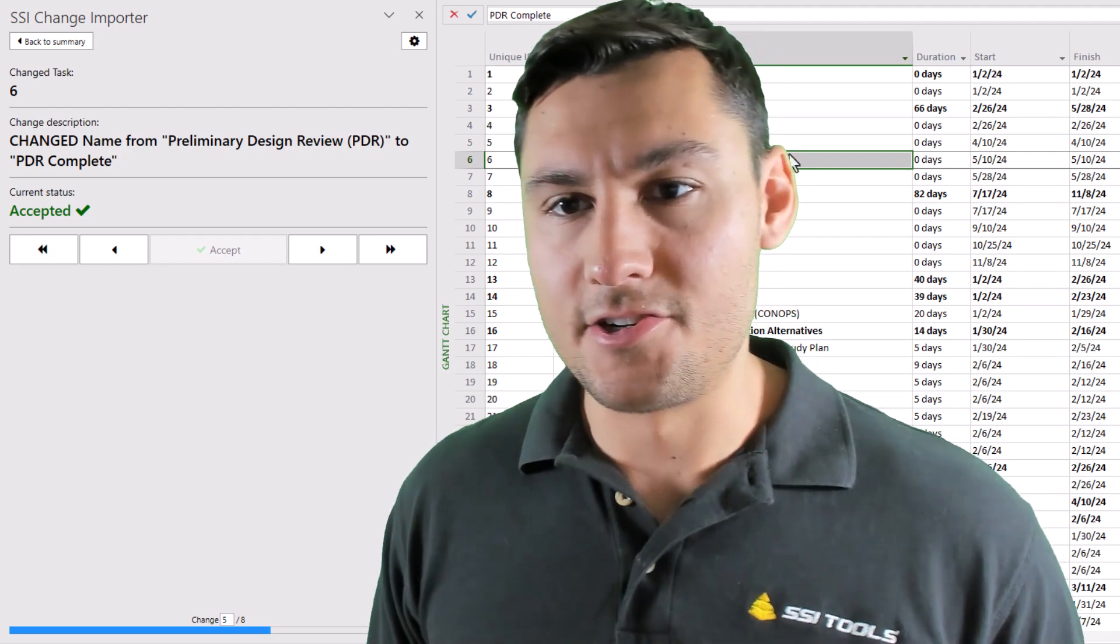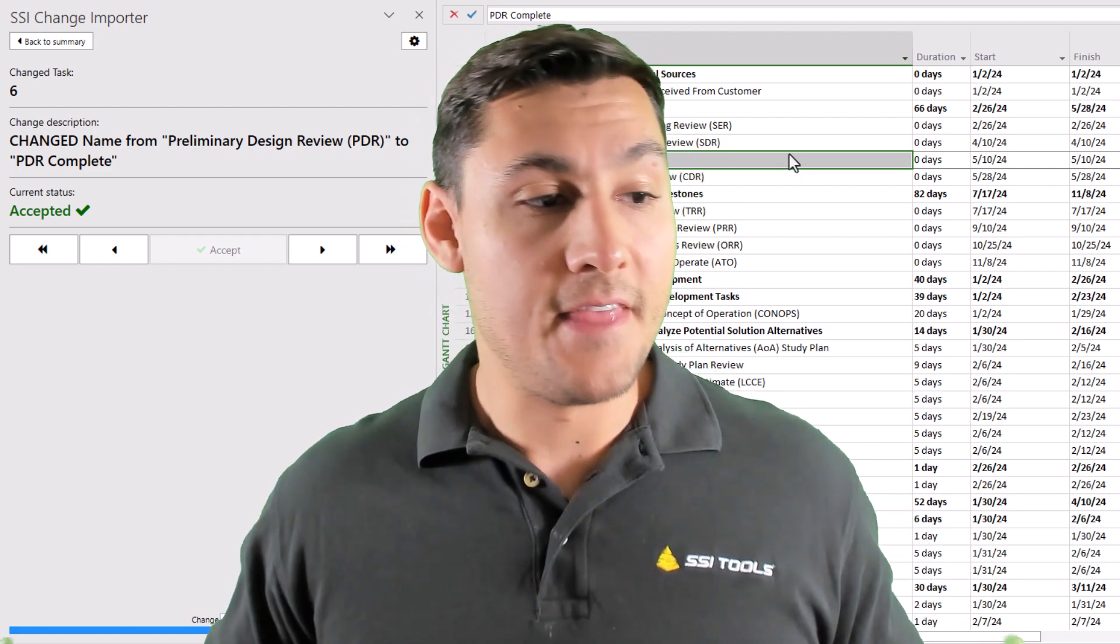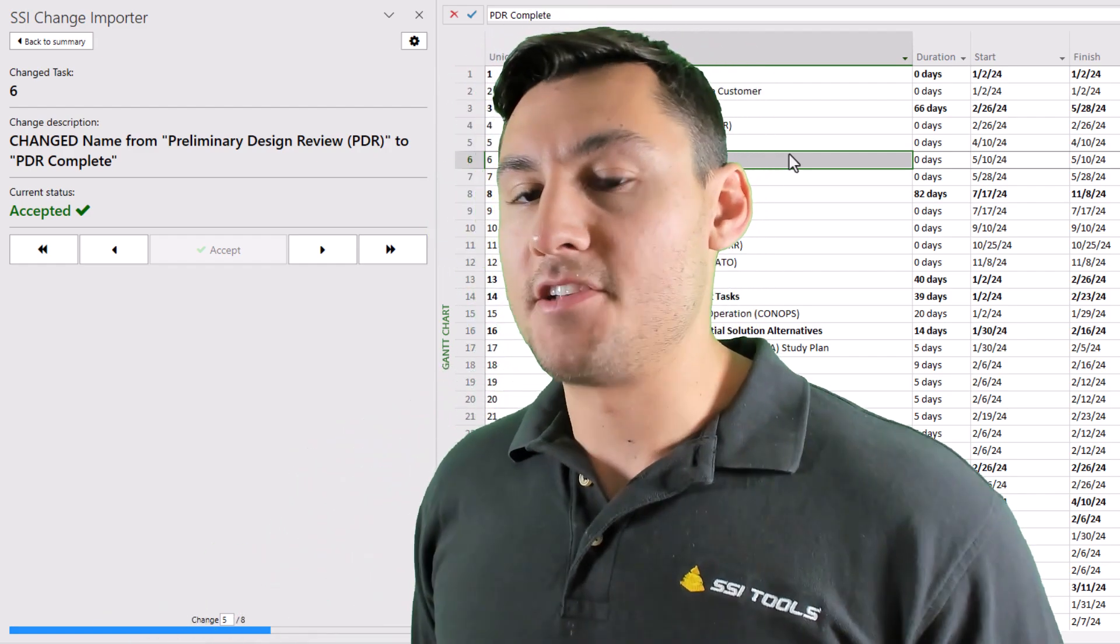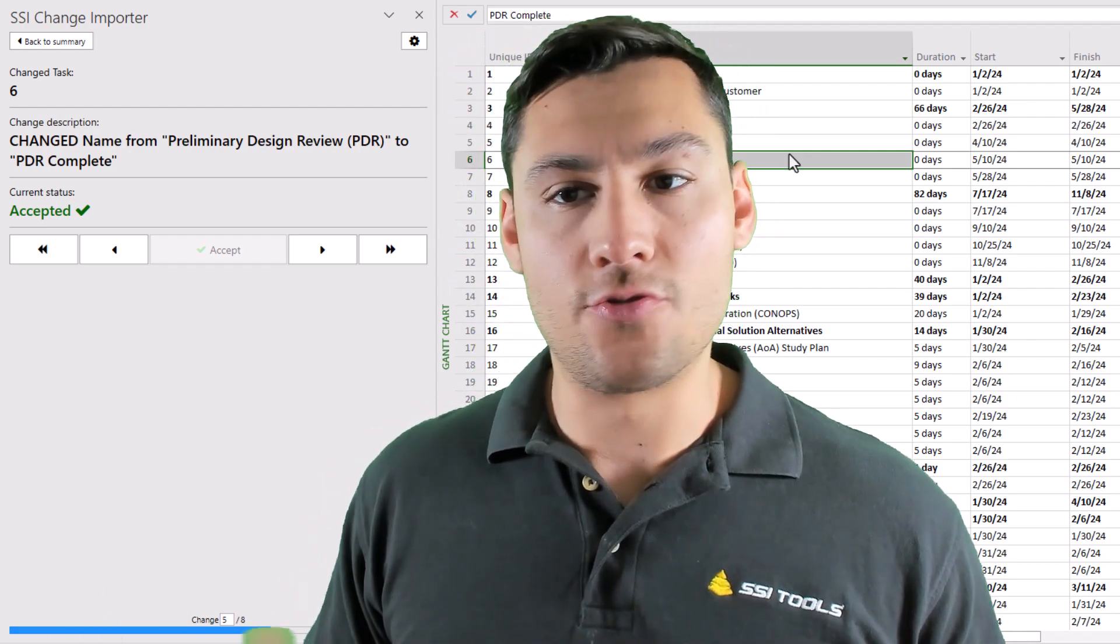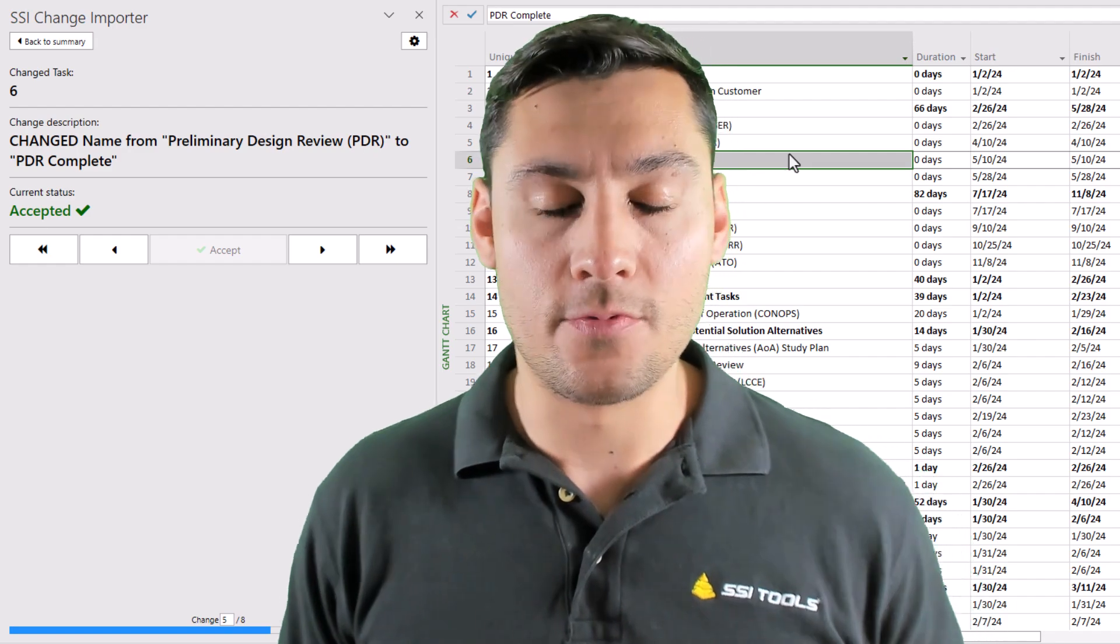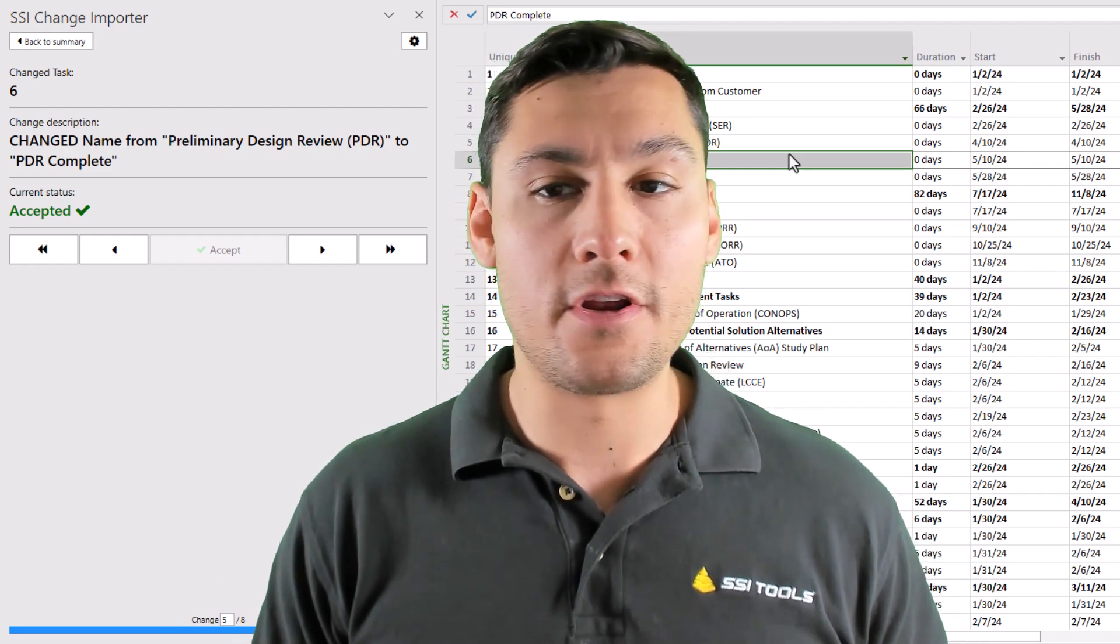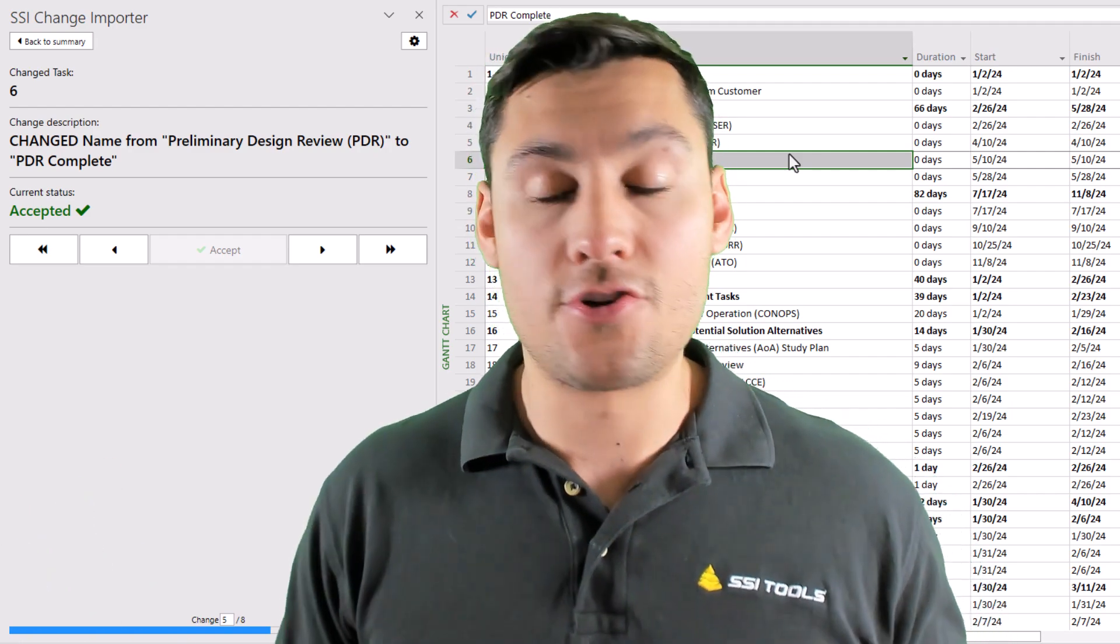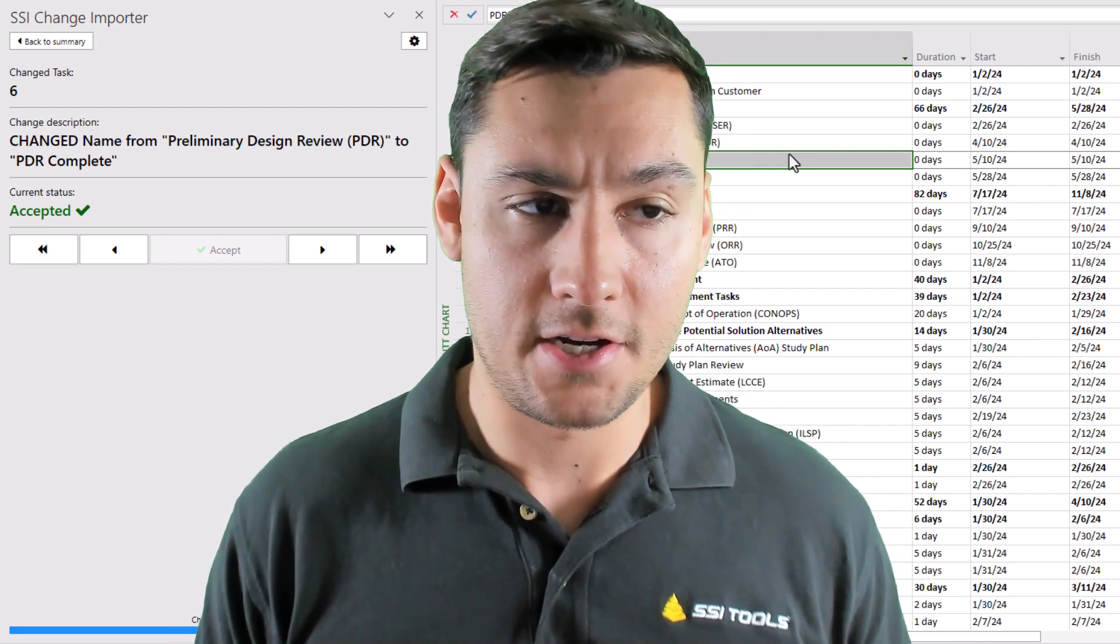Here's another scenario. Let's say that you're working in a multi-project environment where you have multiple sub-project files that get connected together into a single integrated master file, and then that master file is reviewed at meetings with the project manager and other project stakeholders. The driving paths of things are reviewed. The durations of things are reviewed. Perhaps tasks are edited. Predecessor and successor relationships are changed. Maybe tasks are deleted or added. Those can all be recorded from the master project file. The sub-project owners can then take the tracked changes file and import all those changes that are pertinent to their sub-project.